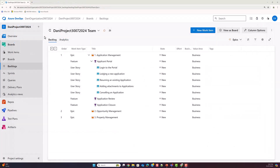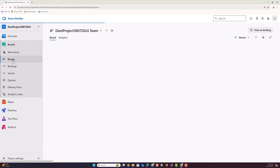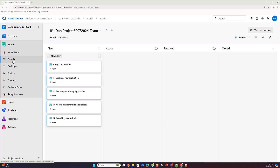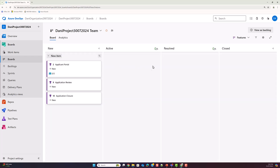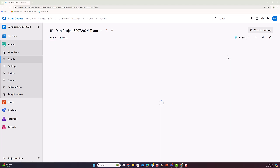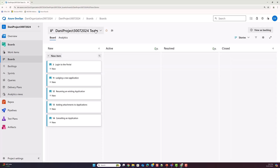Now that we have a few items in our product backlog, let me show you the Boards feature, where you can visualize your work item types on a board. By default it shows the board for user stories, but you can flip it to features and manage those on a board as well, moving them through different stages. You can even see that a feature has five user stories associated with it and how many are completed.